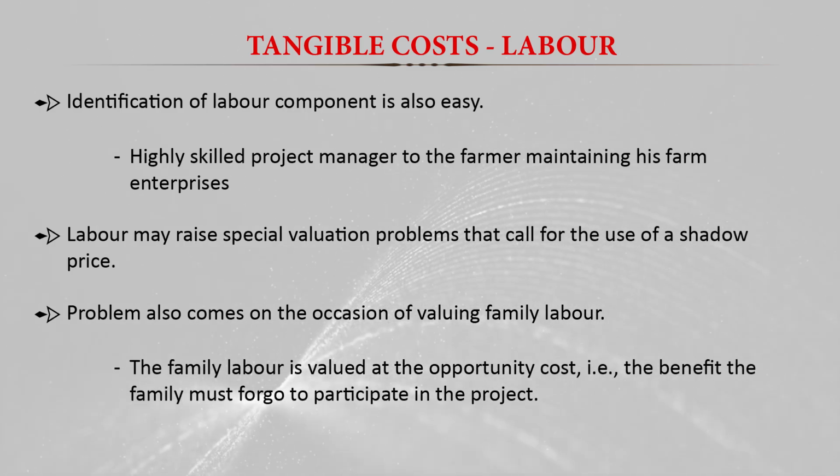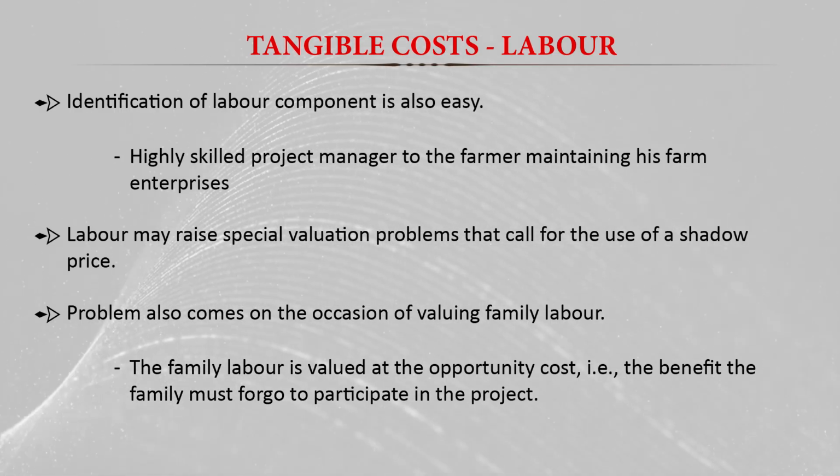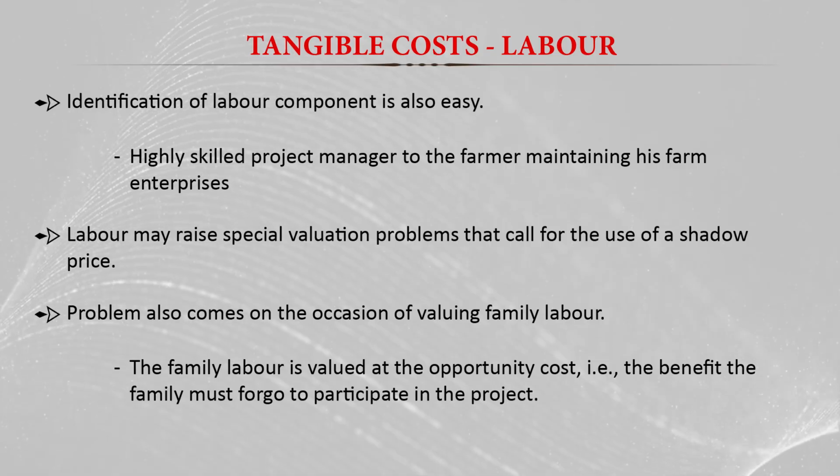Generally, family labor is valued at the opportunity cost, that is the benefit the family must forgo to participate in the project. If you have a family member who is doing the farm activities, if he were not involved in the farm activities, he could go outside as a laborer and earn some money.